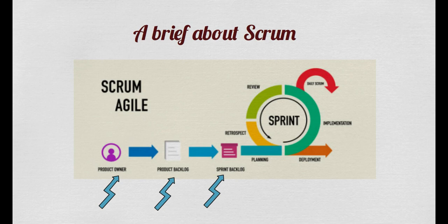This task is done during sprint planning, where assigned developers provide estimates, that is story points, for each of their tasks. Once the sprint is started, the team will track the progress on each of their tasks during the daily stand-up ceremony, which is of a duration of 15 minutes, in order to make sure the team is on track and there are no blockers or dependencies in completing the task. This meeting is facilitated by the Scrum Master to ensure the team is on track and is unblocked.